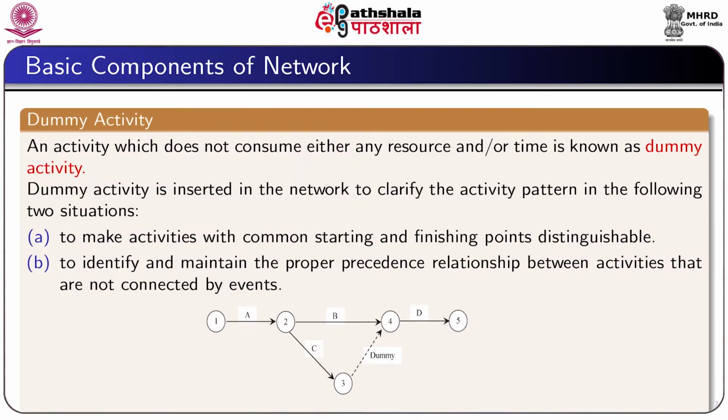Dummy activity: an activity which does not consume any resource or time is known as a dummy activity. Dummy activity is needed for the following situations: to make activities with common starting and finishing points distinguishable, and to identify and maintain the proper precedence relationship between activities that are not connected by events.